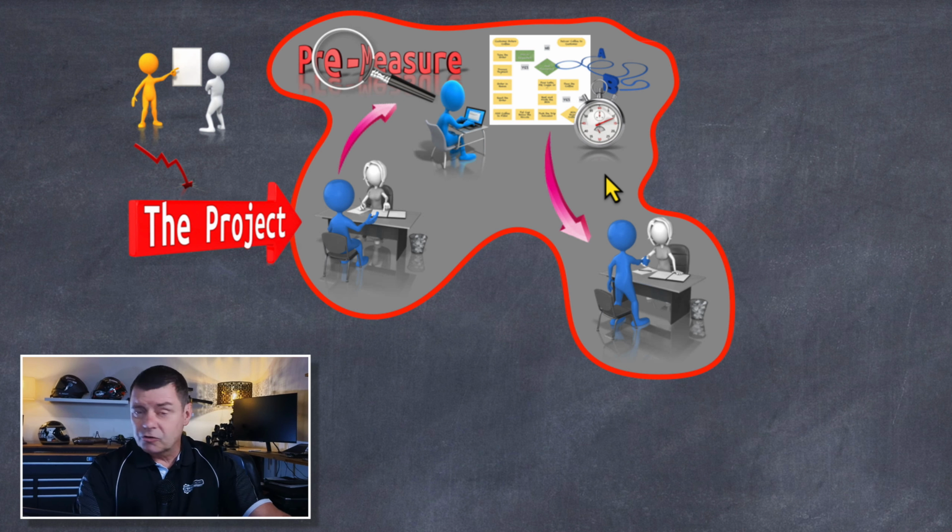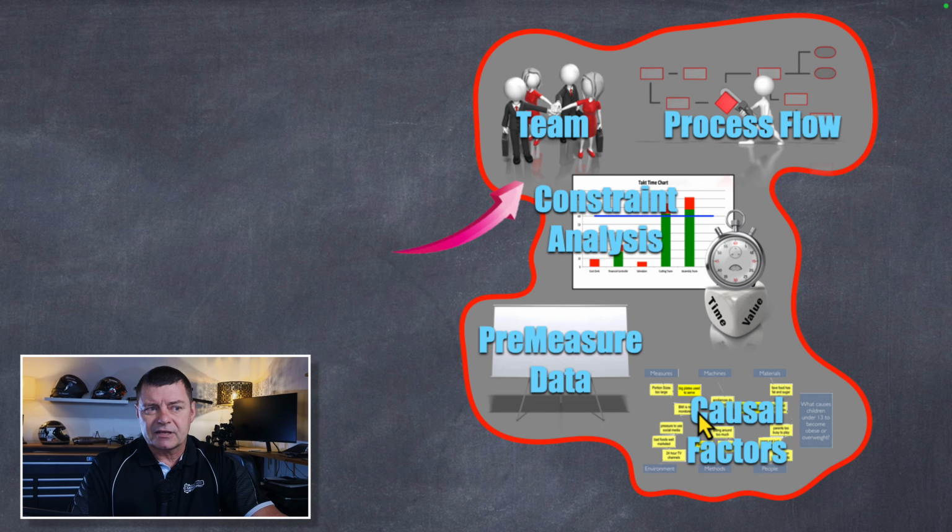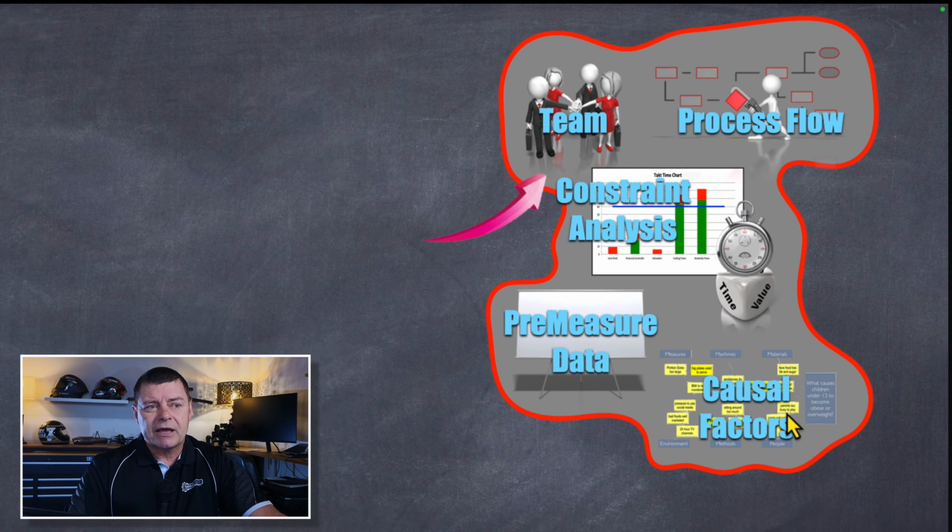The other thing that we do, and we found tremendous value from this, is to bring root cause analysis into play, because the limitation of a lot of lean project tools is that they focus on the analysis of the process specifically, whether it be cycle time or throughput. But what I always found value in is having that additional conversation about what other causal factors that you don't see laid out in a process map would have an effect on the metric or the thing that we're trying to fix. And it's this part that adds some additional value to the project work. But that would be mainly the content of the first meeting. That meeting might take around about 4 hours.